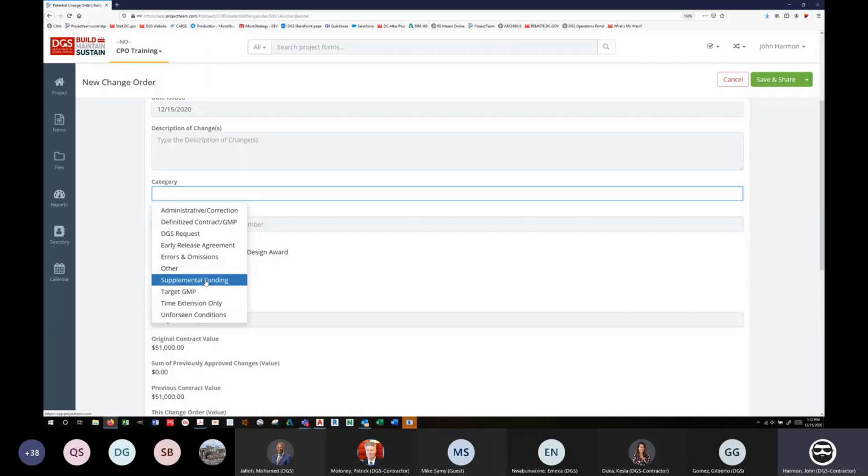If you're some of the administrative contracts for PM services, your contract may say that you have a full fiscal year of services, but they only give you a PO for the first 3 months. The second PO is a change order and it's just supplemental funding.